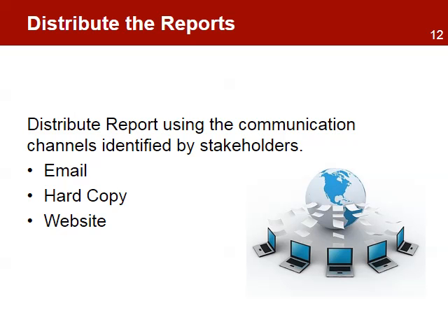Distributing the reports is the next step of the process. It's important that the reports are distributed using the channels indicated by the various stakeholders. This can include sending the reports via email, a hard copy, or posting the information on a website or intranet, such as reports for senior management. Each report also includes the people that should receive them. Only the people that need the report should get a copy. It adds no value to send reports to people that don't really need them, as it will add additional work for the project.